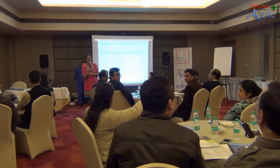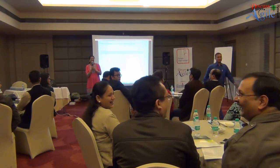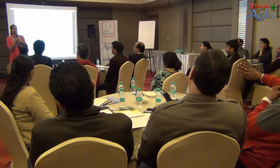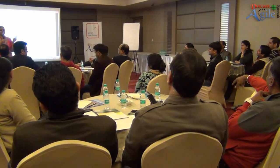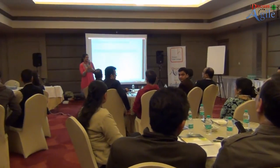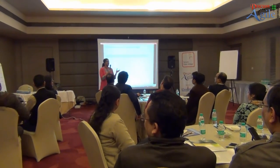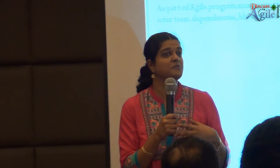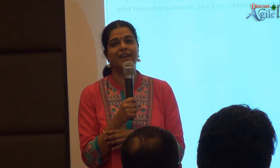If team members report to the scrum master, it creates a problem because then the scrum master also does appraisals, which conflicts with the servant-leader role. In Scrum, the appraisal is done by a separate person. If the team reports to the scrum master, people may not express their problems freely, which undermines the purpose of the role.